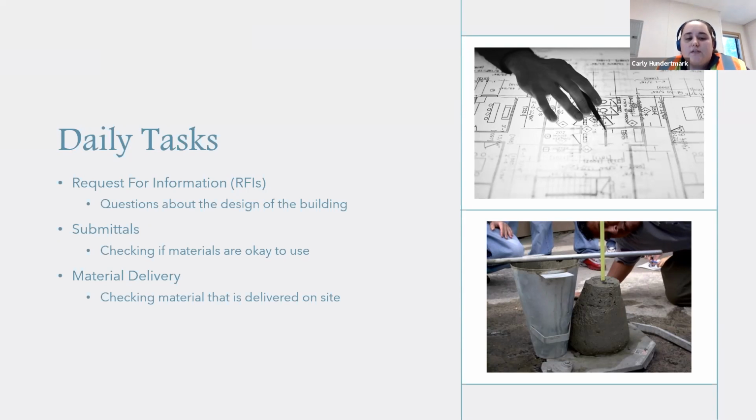These are just questions about the design of the building. If something isn't dimensioned properly, so they don't know where to place it in the building, that will come up. Or if they want to substitute a material for something else, that might also be in there as well. The next thing that I do is submittals.